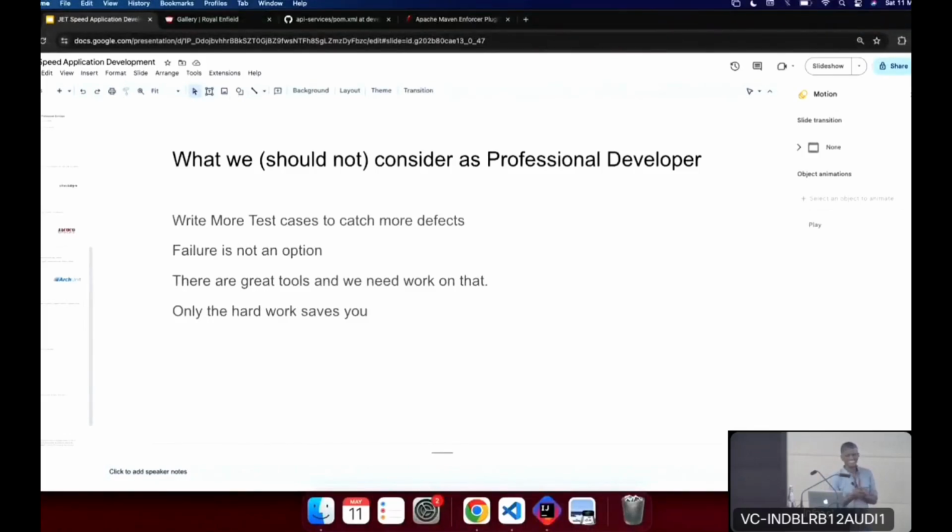I have one add-on for this, where we said that there is a stand-up, right? For that, there is one suggestion: wherever there is a dependency on the other teams, a stand-up of stand-ups. Yes, for the stand-up. So wherever the developers have a dependency, they can call it out immediately, and the dependency can be taken as a priority. Exactly. Very good point.